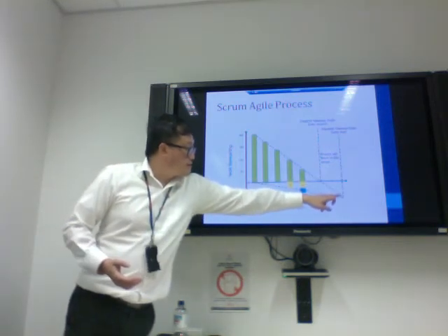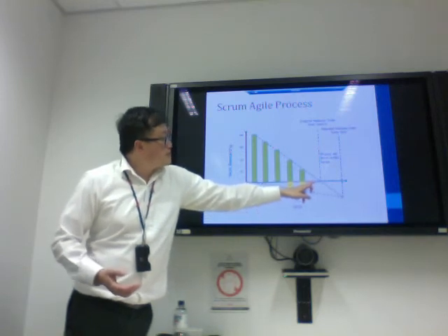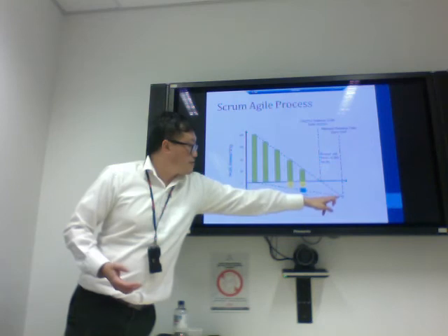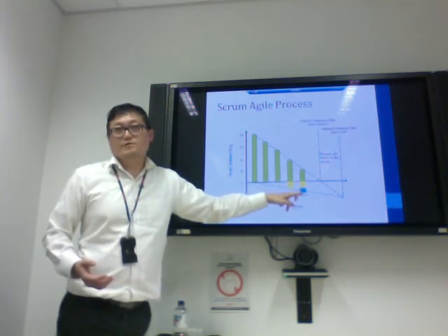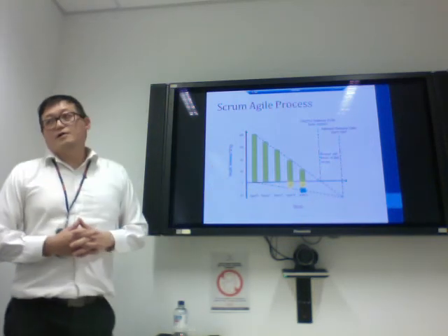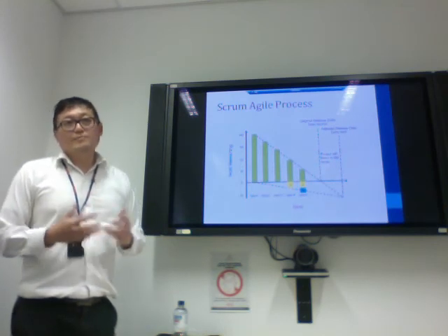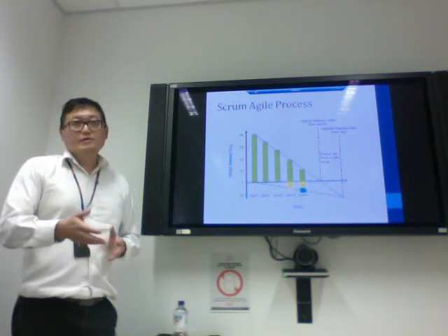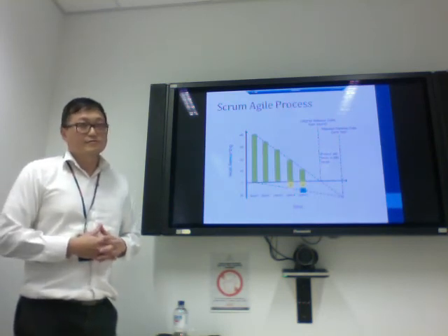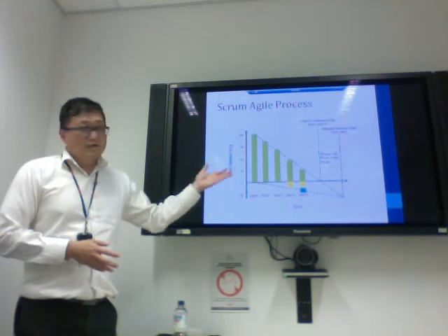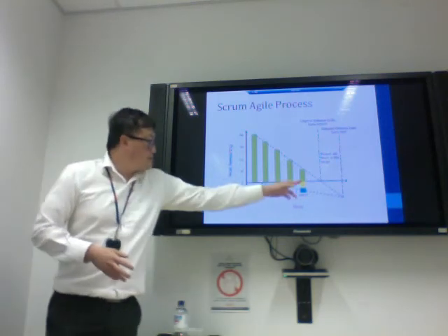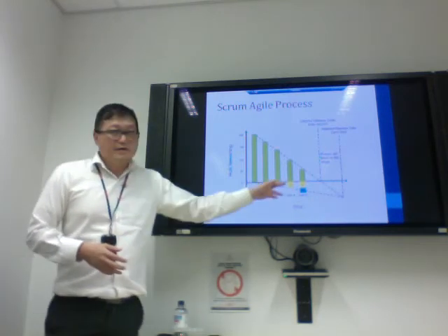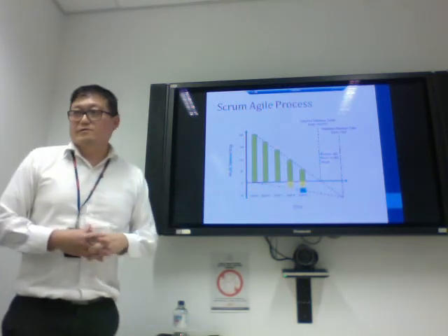For example, in this case, we intended to release in early March. Now it becomes early April because there were a few things we didn't anticipate before. So this chart allows us to represent those changes that come along, and at least we can communicate to the stakeholders or the product owner what the impact of these changes is, as opposed to still being stuck with the original plan despite all these variations, which is not really realistic.